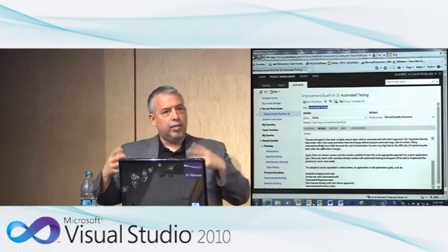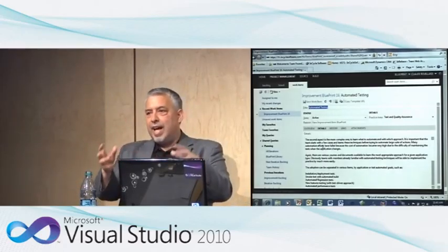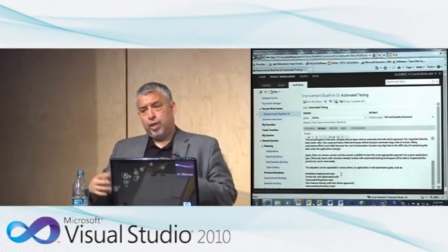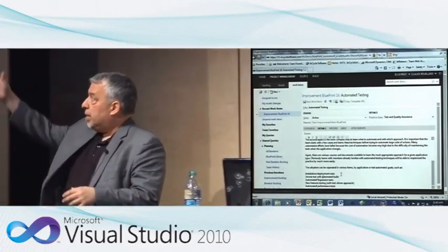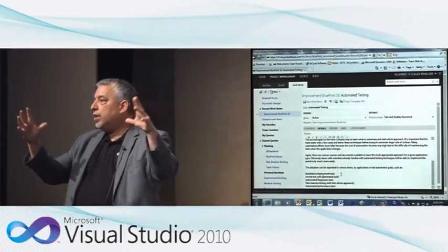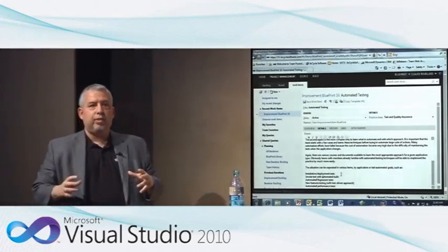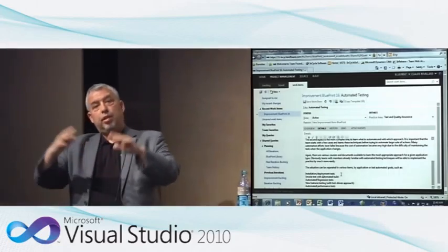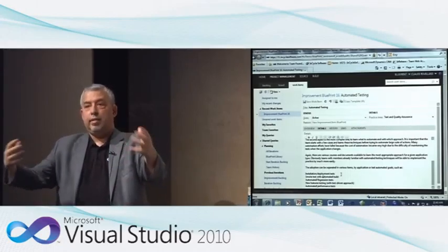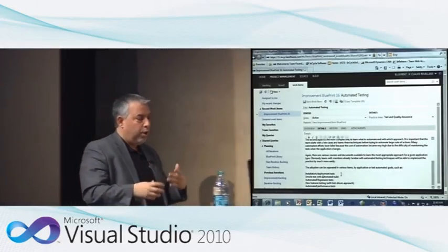So on all of them, we're trying to give a sense of how that initiative could be done. And in this case, for example, we're saying, look, maybe you want to break it into 4 or 5 other ones, right? Because we want them small enough that it's in one implementation. So you might say, instead of learning all about automating all this, maybe we'll start with a smoke test, and then we'll add something else, and we'll add something else.